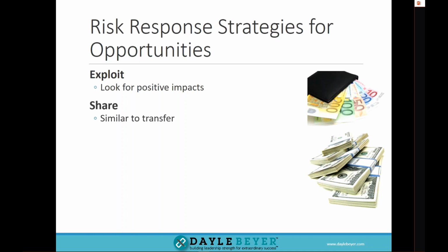You can also share who's going to own the intellectual property that's produced as a result of the project you're working on. Sharing resources often happens as well. Enhancing, or looking for root cause of why something is happening. Let's not just deal with the symptom. And enhancing triggers. In other words, how are we going to know that we have incomplete requirements before it happens? What could we look for to know that's happening before we find it out when we're doing testing?